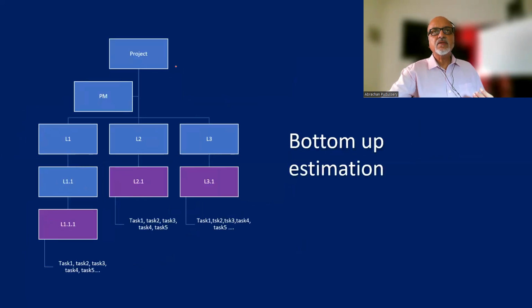And once the WBS is frozen, the next step is we break the work packages, the lowest level, into activities. The work packages get decomposed into activities.